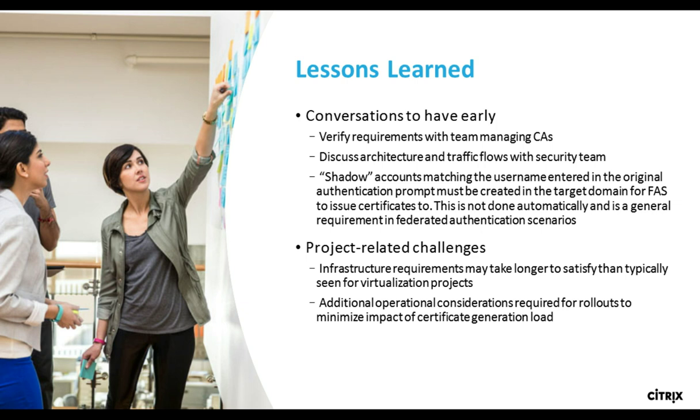There are additional operational considerations required for the rollouts, effectively to minimize the impact of the certificate generation load. What that really means is that you have to stagger the onboarding of users into the platform, so that we're not bringing everybody in at exactly the same point in time and effectively forcing a logon storm, if you will. You can do that if your systems are scaled, as we discussed earlier. If they're scaled properly, you can go ahead and do that. If they're not, and we're looking at more of a warm start type of scenario, we have to make sure that we stagger those user logons appropriately.